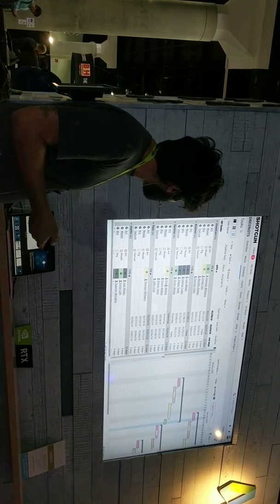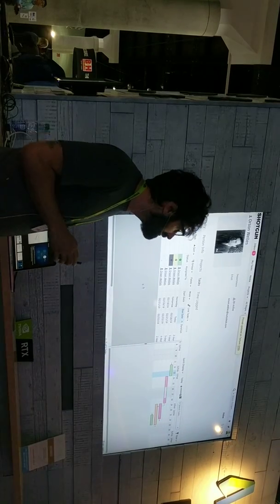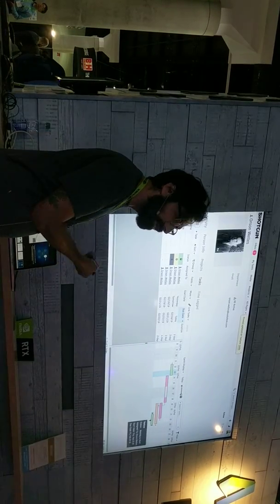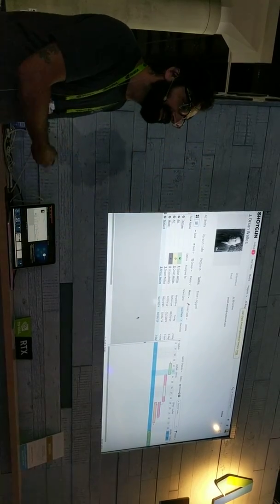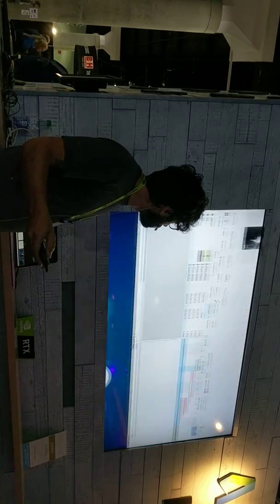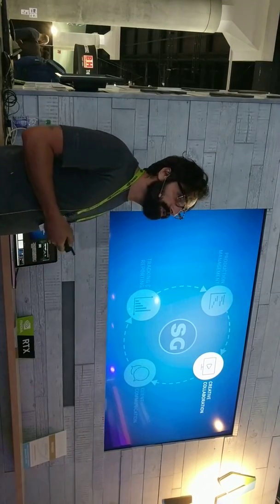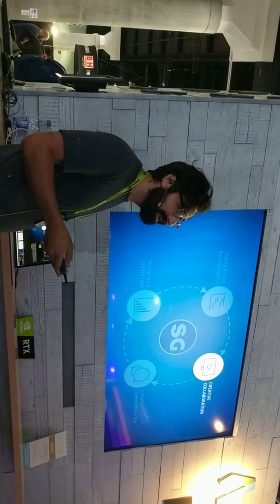But what about this artist, Orson Welles? What is he up to and what does he need to complete? I can drill in directly on what's been assigned to him and see that in the 3rd week of production he can never possibly complete all of that, and I can load balance his tasks. But now let's move on to the next experience, creative collaboration.